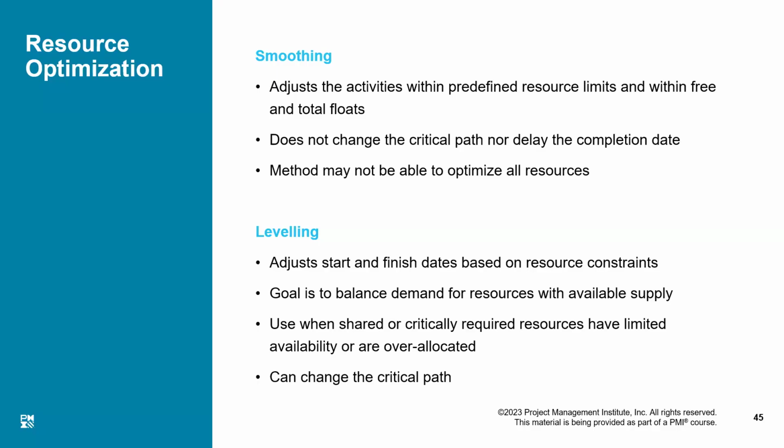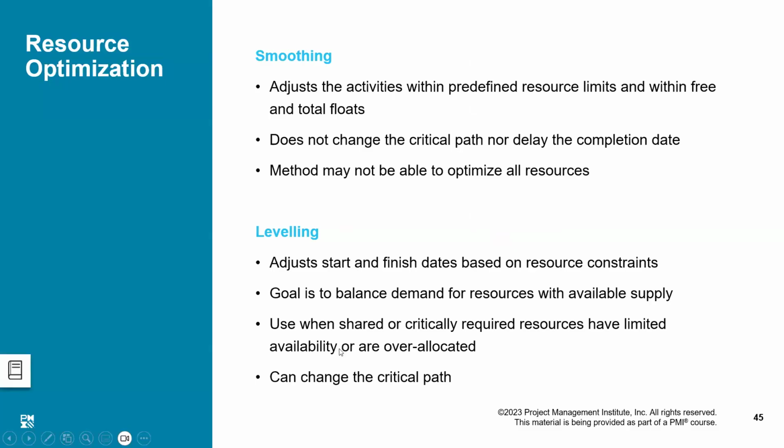When you apply the resources and make it a doable schedule, that becomes a realistic schedule. So critical path method creates a schedule without considering resources. After that, you will apply the resources and check whether it is doable. If not, you will optimize using smoothing or leveling or both.